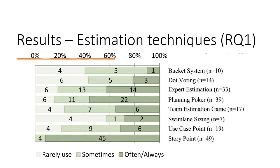This figure shows the results of estimation techniques in agile software development, presenting only the techniques actually used. As seen in the figure, the most used estimation technique is story points, followed by planning poker, expert estimation, and the least used technique is swim-lane sizing. To estimate, most participants use the Fibonacci sequence, followed by ideal days and t-shirt sizing as measurement units.